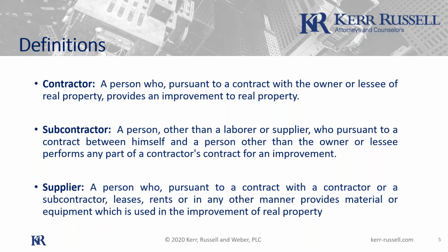Which kind of brings me to the discussion of the nuts and bolts on how you file your lien. So there's this, what I call kind of a complicated dance that is set forth in the different things one must do in order to perfect a lien. There are dance steps that have to occur both from the owner's side for him to protect his rights, and from your side in order for you to protect your lien rights. And those are made up of the notice of commencement, the notice of furnishing, and the claim of lien primarily.